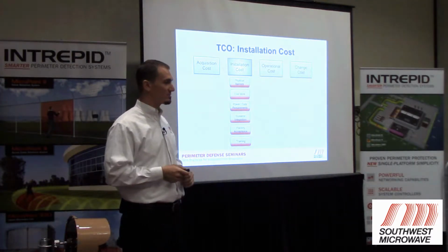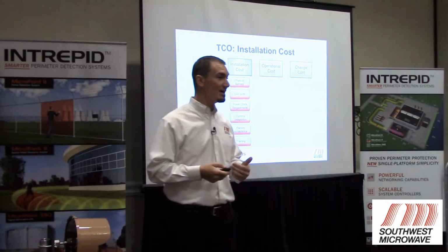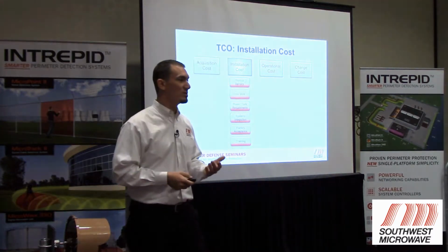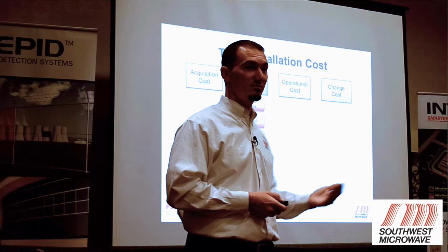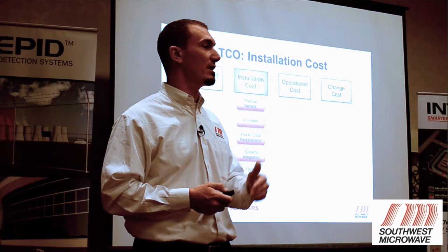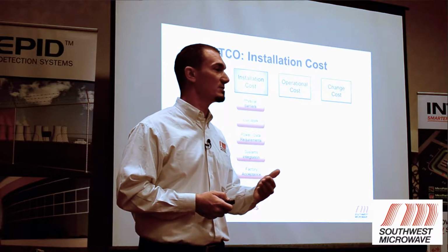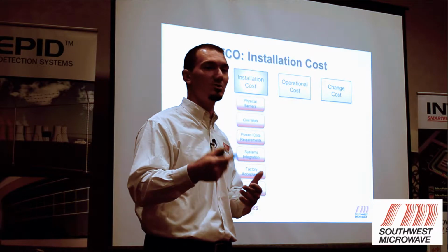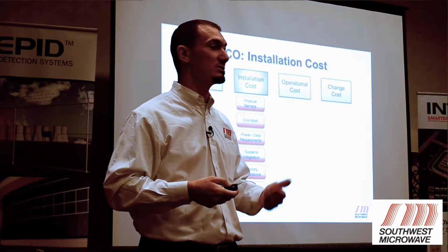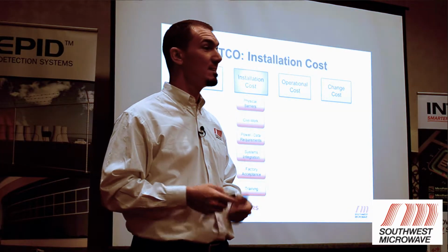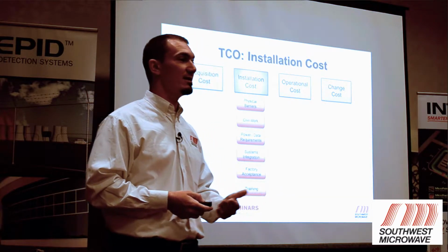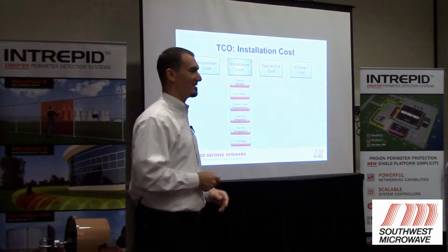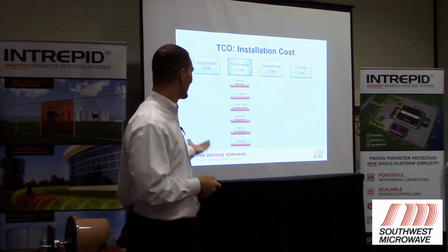And then whether there's factory acceptance testing or not. For us, anything larger than a 4-processor perimeter, we usually tag on a site commissioning or factory acceptance. We have one of our technicians come out to the site. They're going to do a commissioning trip. They're going to visit the site, look at each of the processors, and inspect the cable and the configuration. They're going to make sure it was installed according to factory recommendations. Many users will want a factory acceptance course. And then, of course, we've got training listed on there because training falls under every aspect of this.